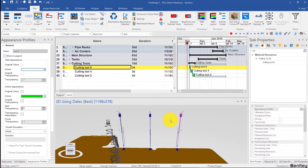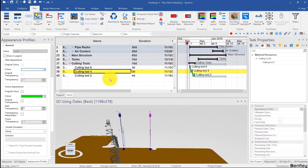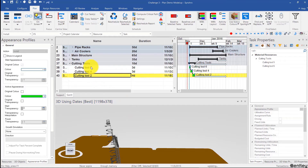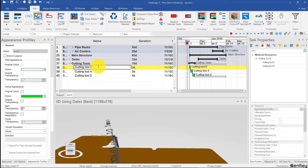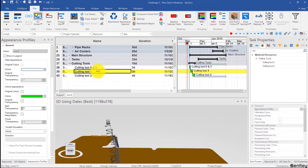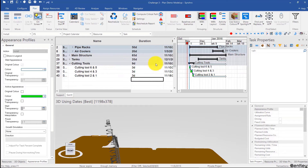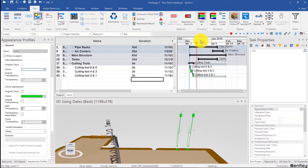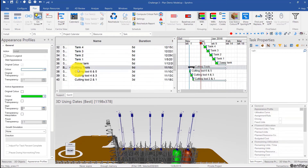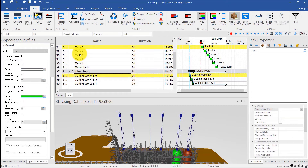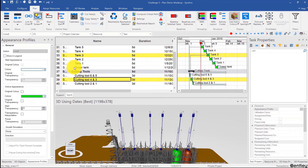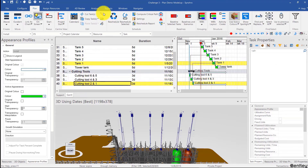Then for each one of these I'm going to add the other. We can rename these if we want to six and five, then four and three, then two and one. We can make each of those a three-day activity. Now when do the cutting tools come in? They have to come in after the tanks. So tank five has to come before cutting tools six and five — Ctrl+L. Tank three has to come before four and three — Ctrl+L. And tank one has to come before two and one — Ctrl+L. Then reschedule.